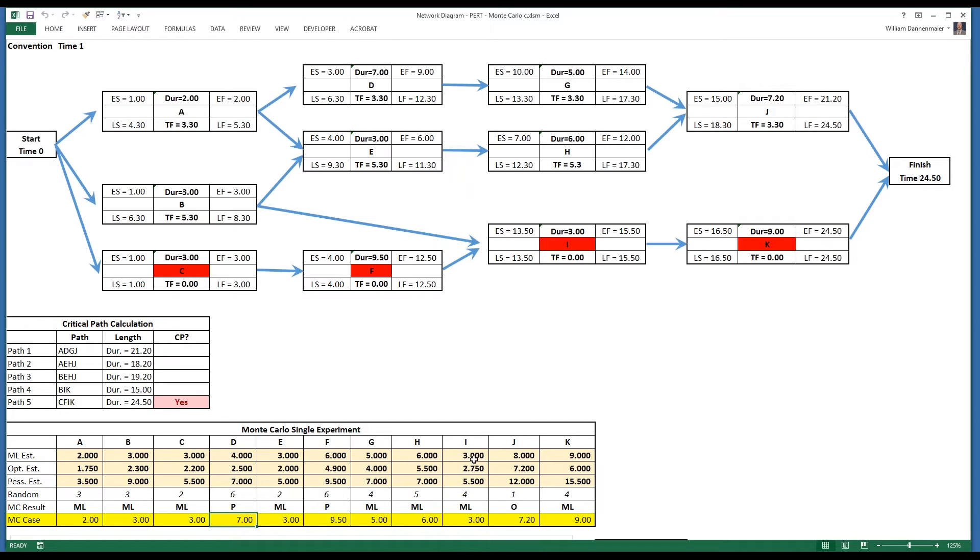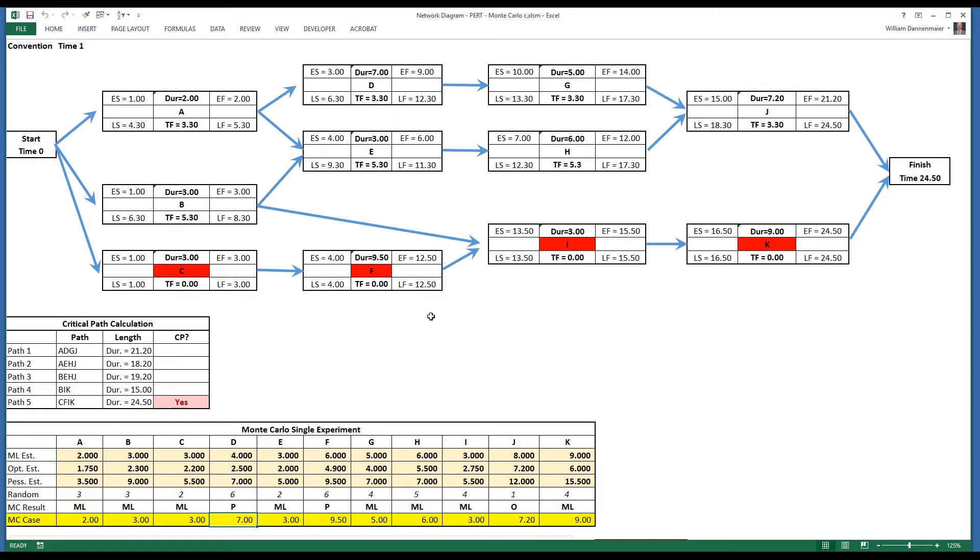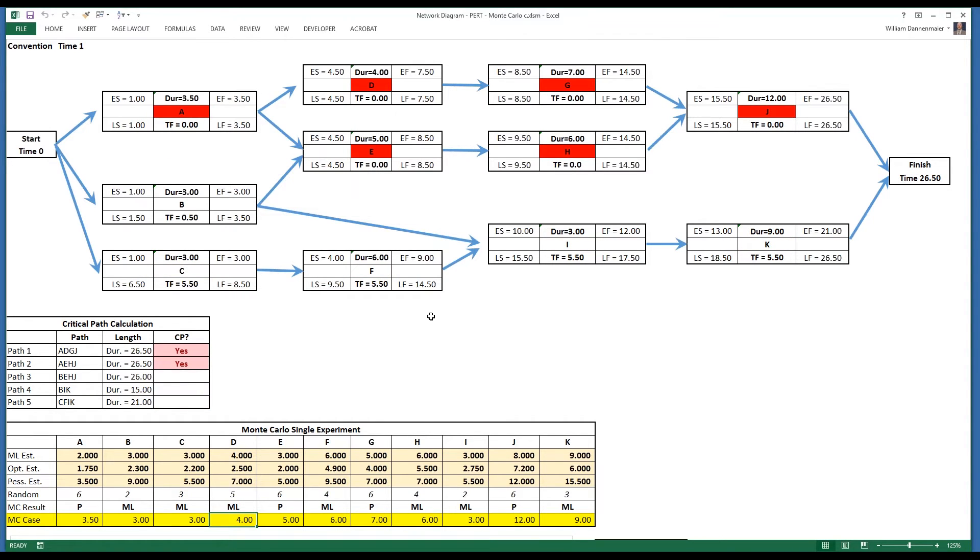In this way, the most likely is weighted with 66% of the results. Based on random now, we have a value from the estimates being selected and constructed using the dependencies above into a network duration. Recalculating random will be a new experiment or iteration of the model. So we'll recalculate once. This time we've recalculated.